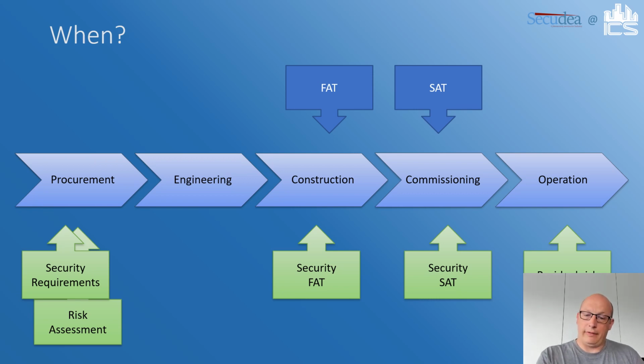I put cybersecurity FAT SAT testing on the construction phase because actually that's at the vendor side during construction, during test environment. You can choose to do that before, during, or after functional FAT testing, and the same with the SAT testing, cybersecurity SAT testing. That's during commissioning, and you can choose to do so before, during, or after functional SAT testing.